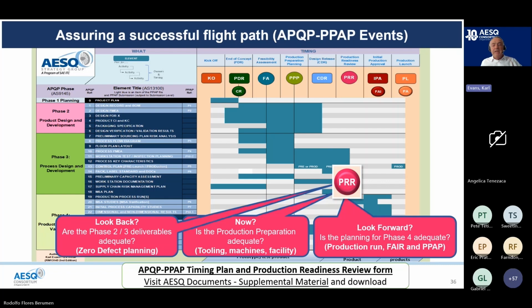And when we talk about validation, you can summarize that as the production process run activities, some of the evidence we talk about, some of the information and data that comes from that: initial process studies, SPC data, dimensional, non-dimensional results. We've talked about that. And what this is doing is saying, have we planned ahead? Along with first article and then ultimately the PPAP submission and disposition of that.